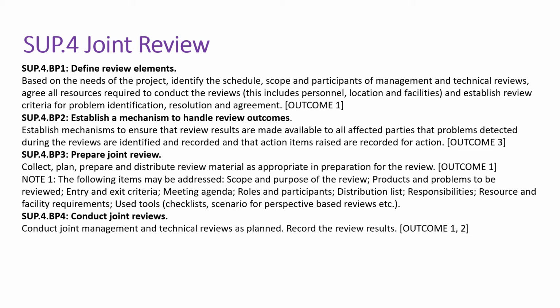And your BP3 talks about prepare joint review. So you have to collect, plan, prepare and distribute review material as appropriate in preparation for the review. So your note 1 says the following items may be addressed: scope and purpose of the review, products and problems to be reviewed, entry and exit criteria, meeting agenda, roles and responsibilities, participants, distribution list, resource and facility requirements, used tools.